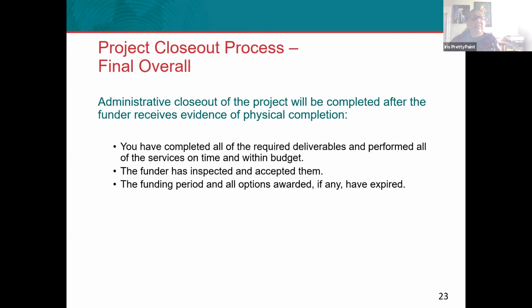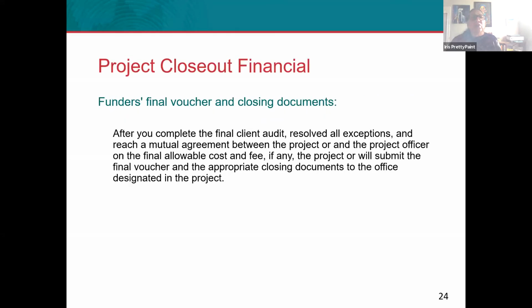So again, if you have a 1-year grant and you're doing your closeout for that 1 year, that's kind of like the checklist that you'll be creating. But if you happen to have multi-funded years, then you want to make sure that you have closeouts for each one of those years, and then one overall closeout that you're able to share with the funder. And if you had maybe years that were not funded, and that contract ends, then that'll be your final closeout for that year.